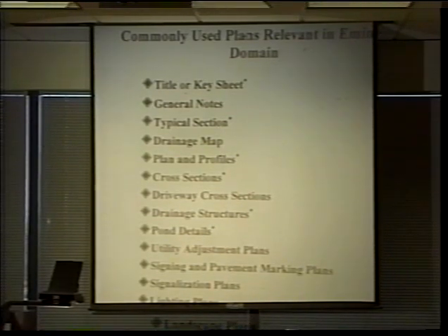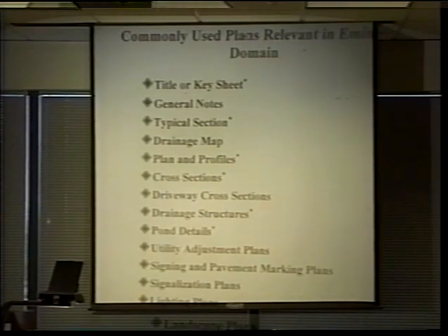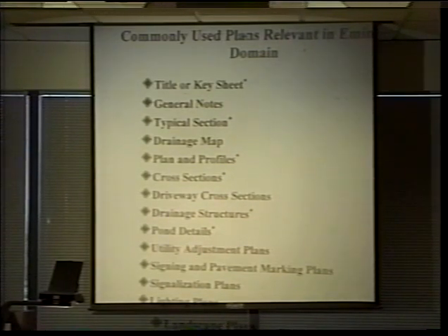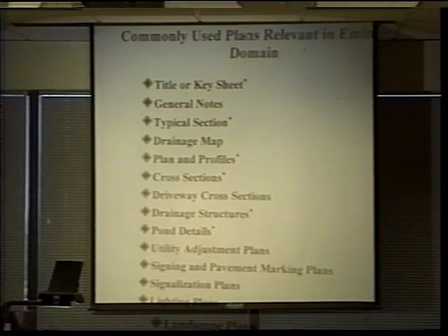If it's a commercial business that's along a road, the general notes would direct the contractor that by the end of the day, a disturbed driveway must be replaced or repaired. So those general notes are what you want to focus on in terms of the direction that the contracting authority is giving to a contractor on how to build the facility.